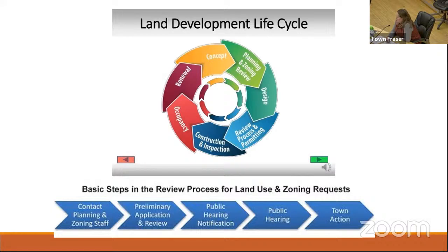After the town board approves that subdivision plat, that plat would then get recorded in Hot Sulphur in conjunction with a subdivision improvement agreement, which would provide surety for all the required infrastructure. And then that infrastructure would go through the acceptance process and the warranty process, and then eventually be turned over to the town.